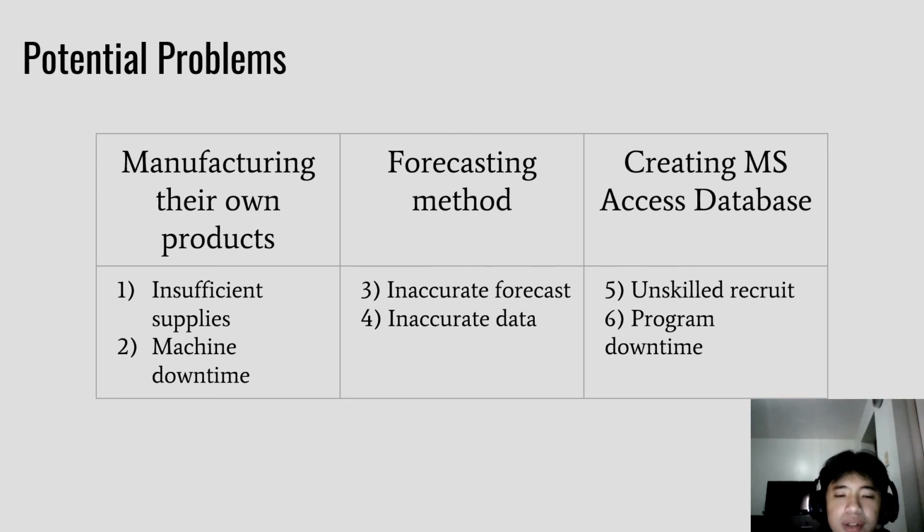The likelihood is 3, but the severity is 5 since, as I said, it is the current problem. So the risk score will be 15. To prevent this from happening, always be meticulous in inputting data. But the corrective way is to apply problem analysis as well to see where the error started.